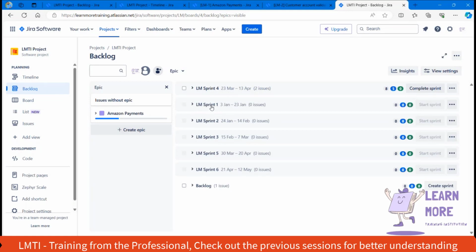If you are unable to complete the planned user story in one sprint, then they will move the user story from one sprint to the other sprint. The process we call a carry forward, or a spillover. Okay, so generally in agile we have transparency. If you go to the backlog, everything is stored epic-wise.